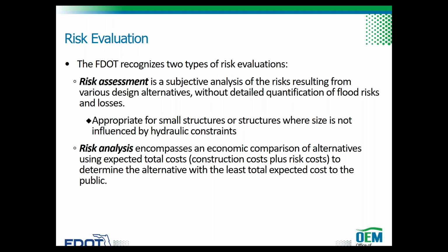Risk assessment is a subjective analysis of the risk resulting from various design alternatives, without detailed quantification of flood risk and losses. It may consist of developing construction costs for each alternative and subjectively comparing the risk associated with each alternative. A risk assessment is more appropriate for small structures or for structures whose size is not influenced by hydraulic constraints.